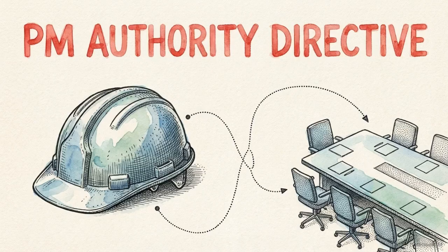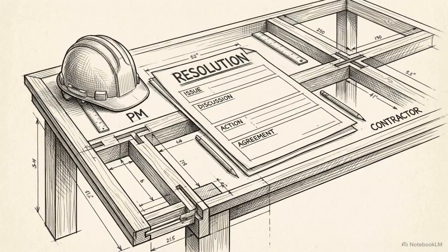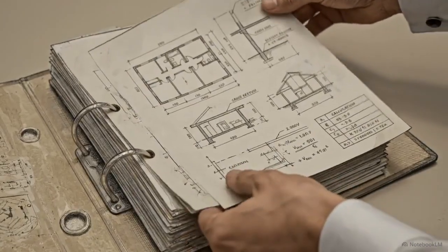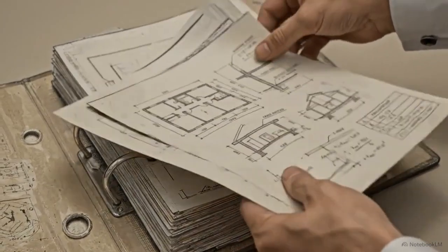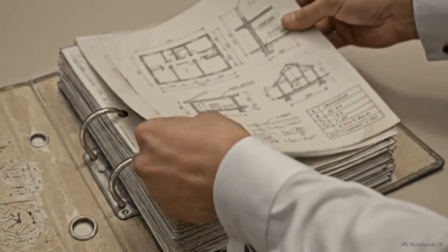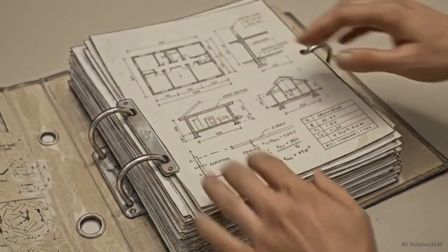Pay attention to Z Clause Z3.1. It grants the project manager the authority to mandate that a subcontractor attends this meeting if their input helps resolve an issue. Consistent documentation of these warnings and meetings ensures the risk burden is allocated according to the contract, which protects your margins throughout the project.